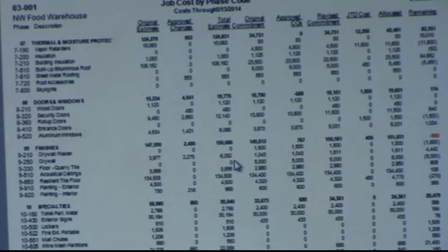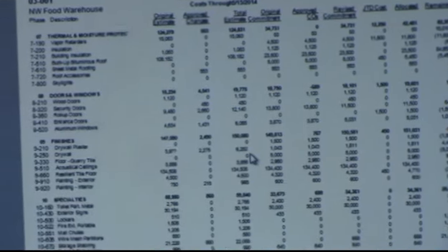Well, if you put your estimate for labor under general conditions in division one, but then in payroll you charge it to division 15 because you're doing mechanical work, that's not helping anybody, with estimate up in division one and costs down in division 15. No one's going to know that those are supposed to tie out to each other. So if you have estimate in division 15 under one code, but the costs are hitting in a different code, yes, one line will say I estimated dollars and have zero spent, and another will say I didn't estimate, but I do have dollars spent. But at the division level, it'll tie out.